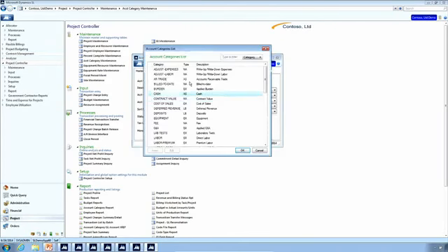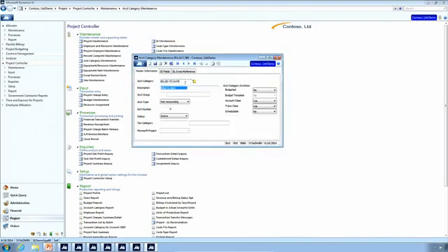Another example of a non-accounting category is billed to date. And billed to date allows you to track revenue. Every time an invoice is posted, billed to date is also updated. So we get a posting to revenue and billed to date. So those are two examples of non-accounting.